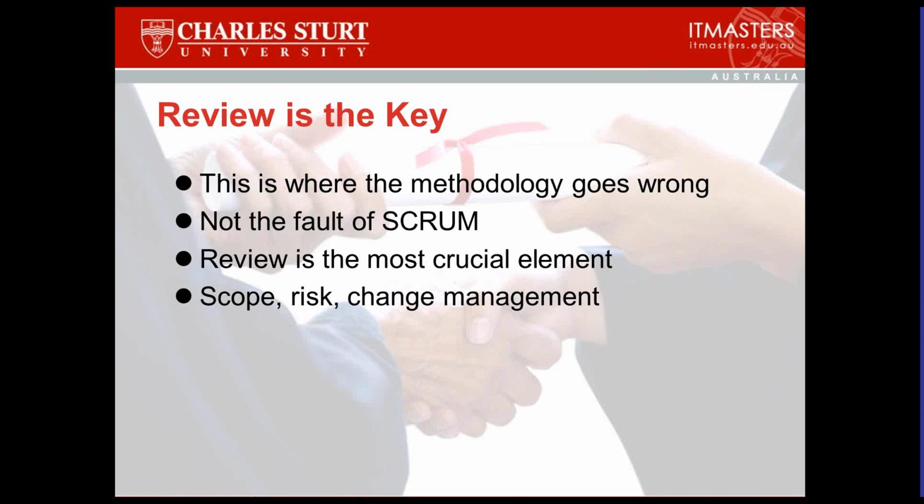We're using it for risk planning because we're saying, well, this information has come out of our last sprint. We've got this. This is going to be a bigger piece of work than we thought because we thought it was going to be easy, and it's not. It's really big, and we're going to have to change how we go about this. And if we don't, our project might fail. It could be that significant that it eats our profit, which may or may not be a very large percentage of our available budget. So the review process is assisting with the function of risk management.